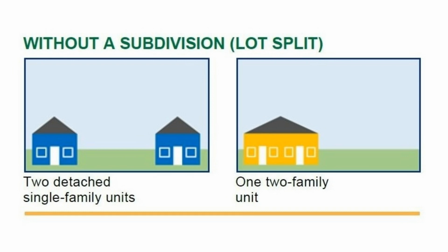Eligible single-family lots may be split, roughly into halves, with resulting lots as small as 1,200 square feet. If the conditions are met for both approvals, the applicant could build at least 4 units on what was originally one single-family residential lot. No public hearing is required for these ministerial approvals. Many cities across the state are considering the adoption of urgency ordinances to amend local subdivision and zoning regulations to comply with state law before the new legislation takes effect on January 1, 2022. Future refinements to the state legislation are expected.